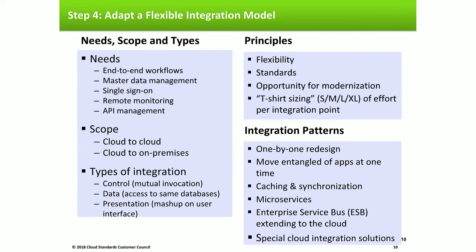My recommendation: at the beginning of the cloud enablement of these applications, try to identify applications that have fewer integrations, are less complex, and have low business impact. Once your teams gain experience, you could consider complex migrations, right?